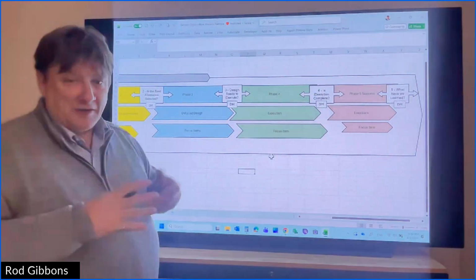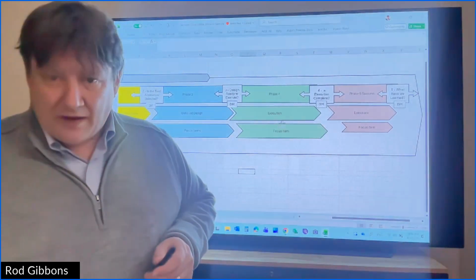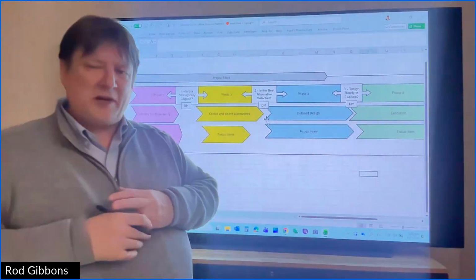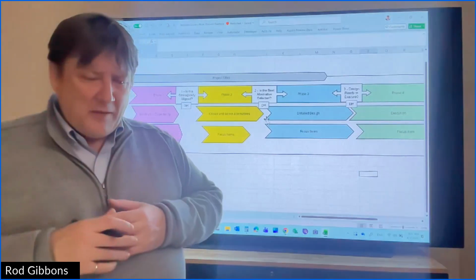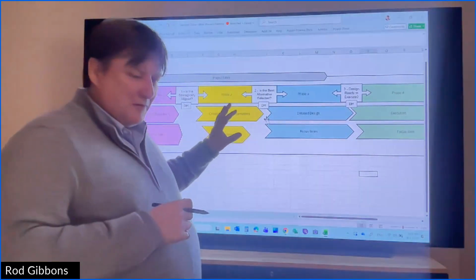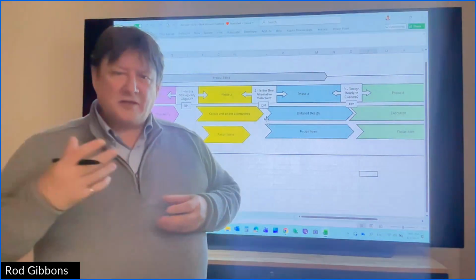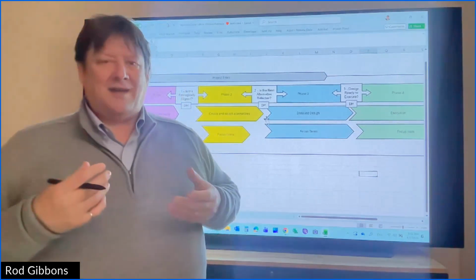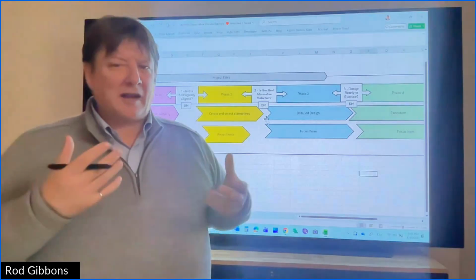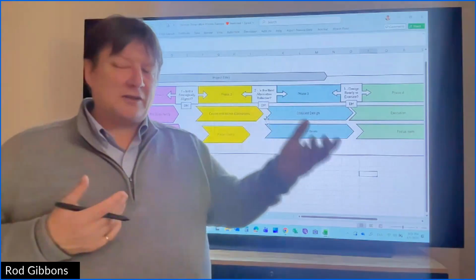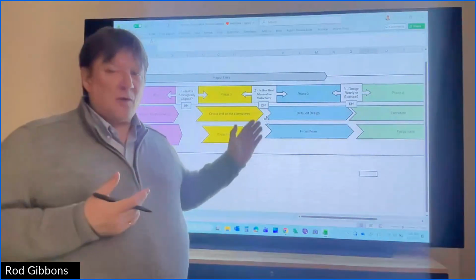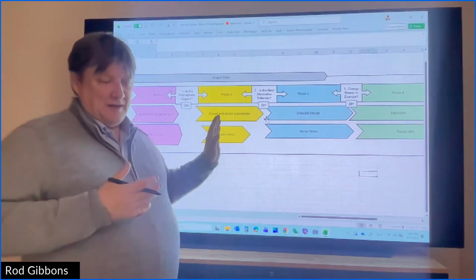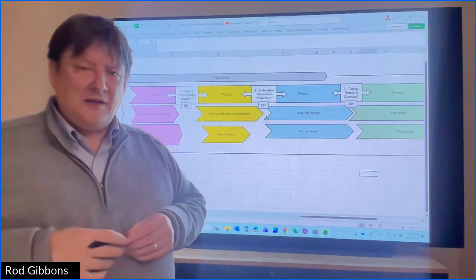Because during detailed design, there's less risk on health, safety, environment. However, again, my experience is that back here in phase 1, and I think more phase 2, is a pretty critical one for health and safety. I've seen a big impact if you have a health, safety, environment team, or a risk advisor engaged in these early phases. I think that really helps in selecting the alternative, because a lot of times stuff can get missed when you're selecting alternatives, especially on the risk side, that doesn't show up until later. And so you put a big amount of effort in here when really there might have been a way to limit the risk by what alternative you selected.